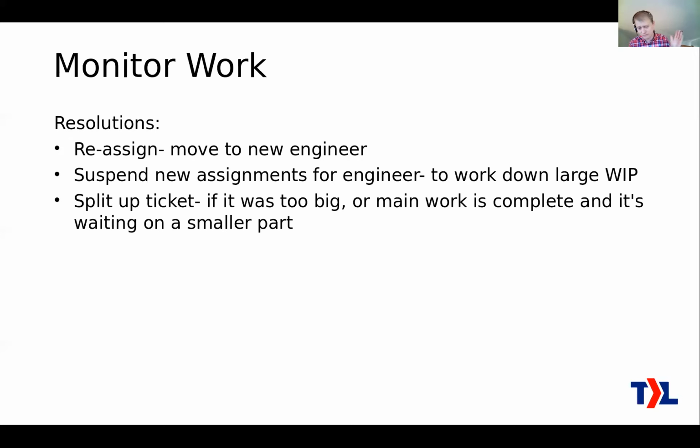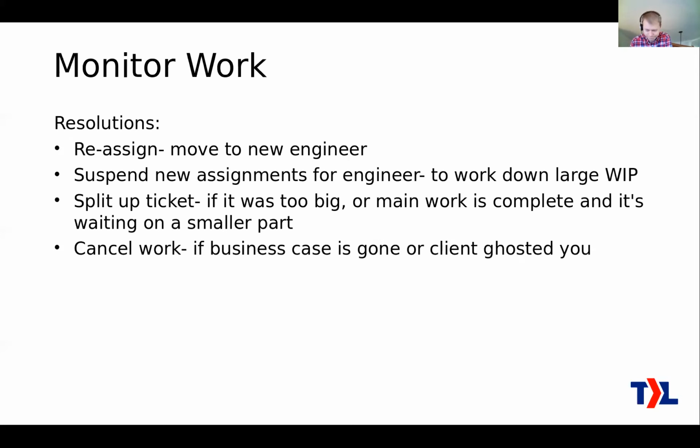Okay, there's no reason that you need to keep that ticket the same size, even once an engineer has started on it. You can go and say, you know what, this ticket was too big. We're going to move this chunk of work to its own ticket. Sometimes, if you're lucky, that means that one of those tickets is already done, okay? Maybe you split it into the work that's not done yet and the work that's already done, and of course, then you have one ticket that you can move all the way to completed.